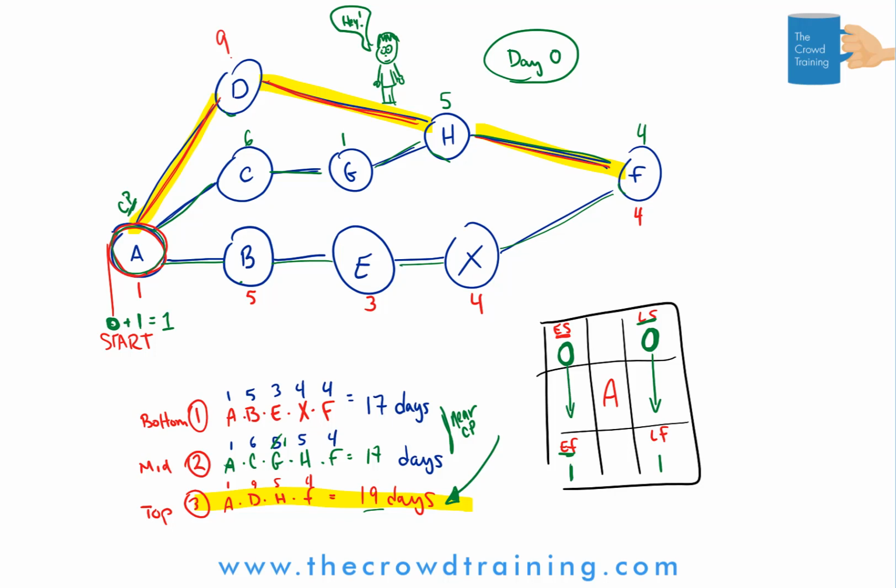So the reason is because you can see there's no difference between the starts and the finishes because there is no float or slack. There's none of it. Because this critical path that we've already highlighted going through is taut like a string. If I tightened it from end to end, it cannot move.